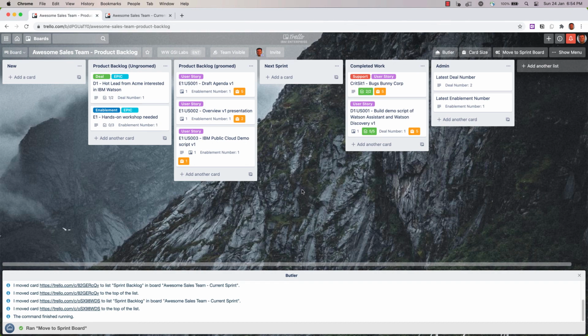We break up this big work into chunk-sized deliverables, weekly deliverables, and make progress. Now, daily scrums and things like that, if you're working with sales executives, maybe that's a little too frequent. Maybe you want to do sort of monthly sprints, and a monthly sprint is what you're going to get done in the month. And maybe once a week is sort of like your daily Scrum stand-up call where you talk about, hey, what's on the agenda for this week. Now, that's not official Scrum. Official Scrum says 15 minutes stand-up or 15-minute daily Scrum call, weekly sprint planning, weekly sprint review, etc.